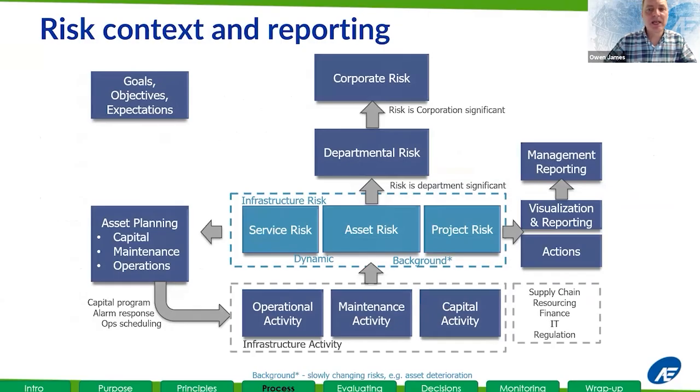So where does risk management sit within an organization? Realistically, it's throughout an organization. There may be tactical risk registers that have a small number of departmentally significant risks that you want to tell somebody about. Of these departmentally significant risks, there may be a small number of the most significant ones that you need to tell the boss about. And these are usually managed by some form of risk committee, if it's corporately significant.